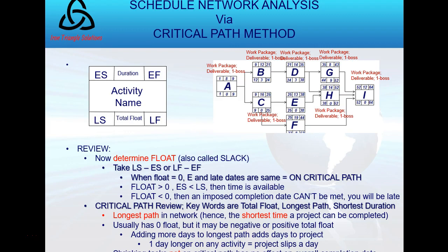To determine the float, I take late start minus early start, or late finish minus early finish. It does not matter which one. They both give you the same answer. So let's take a look on the right, that example.